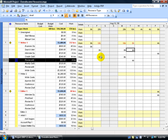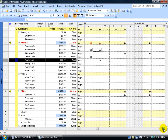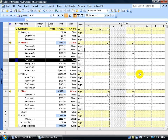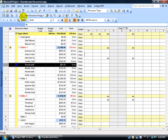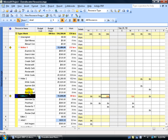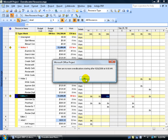So we need to make some decisions. Do we want to shift the task out so it's not happening at the same time the writer is working on the other task? That's one approach — the most simplistic. Just make sure these tasks aren't starting at the same time. To navigate faster to the next over-allocation, right-click on any toolbar, select Resource Management, and bring up the Resource Management toolbar. Click the third button from the left — Go to Next Over Allocation. It's not jumping vertically by resource; it's looking at the timeline for the next over-allocated resource and highlighting it.